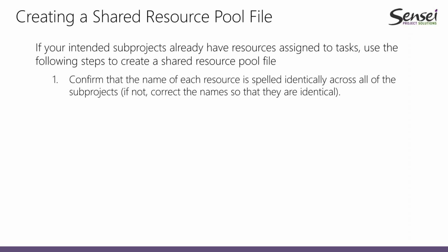Number one, first, and this is very important, ladies and gentlemen, confirm that the name of every resource is spelled identically across all of the sub-projects. You can't have Margaret Cobb in one project and Mickey Cobb in another one, because in reality, Margaret Cobb and Mickey Cobb are exactly the same person.